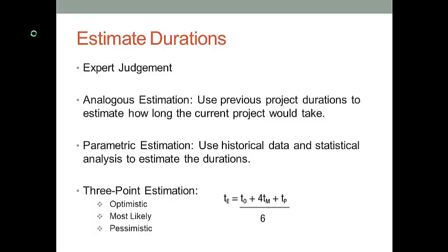You want to compare your current project to the previous project, and then you use how long the activities in the previous project lasted to estimate the durations of the current project.